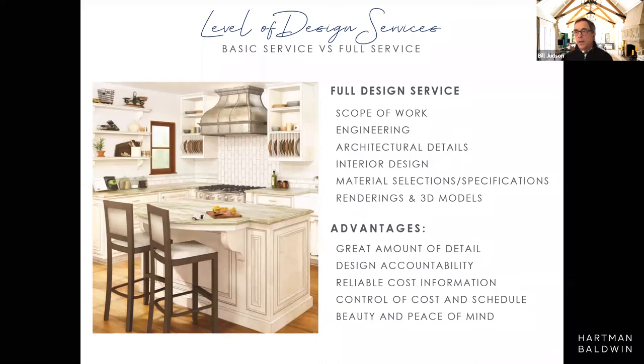We can also get reliable cost information because we know what the tile is. We know what the backsplash is. We know how much of it we need. We know what kind of cabinetry. There are no unknowns, really. And in fact, if you get a chance to see the prequel to this, we'll talk about how we can get to the point where we, HartmanBaldwin, guarantee the cost of construction before we start construction because we've got all of that figured out. And then once we have all of that figured out, now we have control of the cost and the schedule.